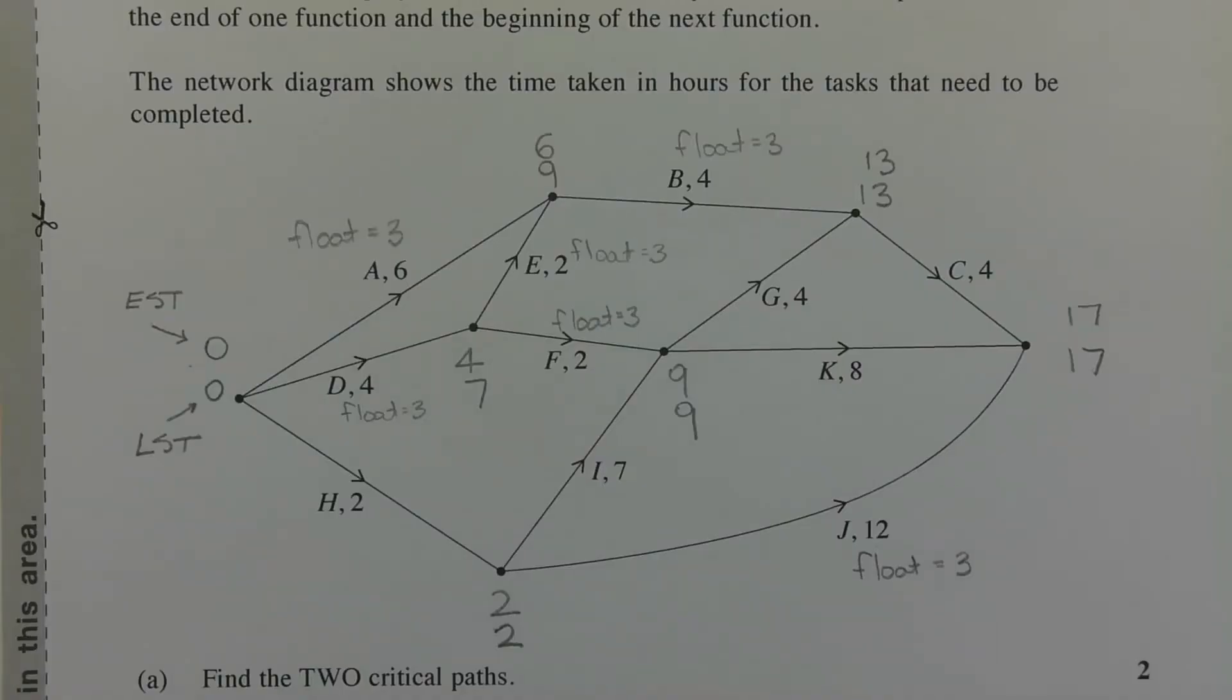In order to find the critical paths we need to identify the tasks that have zero float time. In other words, the tasks that must start on time in order to finish within a certain period of time. So we're going to use critical path analysis, that means finding the earliest start time and the latest start time of each task. I'm going to go through this briefly. Now notice that there's two numbers before and after each task. The top number is the earliest start time of that task and the bottom number is the latest start time. So that's EST and LST.